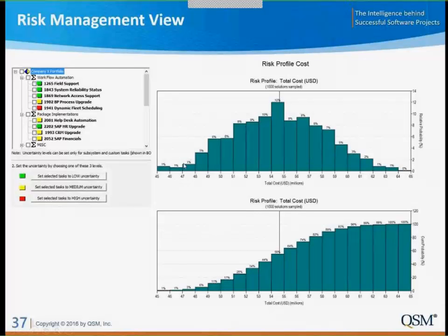$45 to $49 million range. So it gives us a little bit of probability protection, which is useful from management reserve planning at the C level. So it's another independent but useful mechanism for looking at the uncertainty associated around a portfolio.